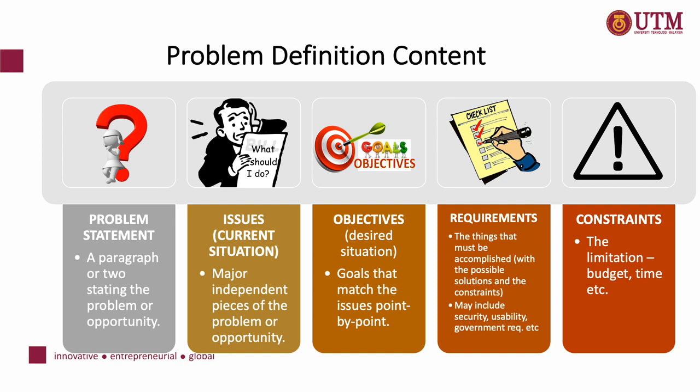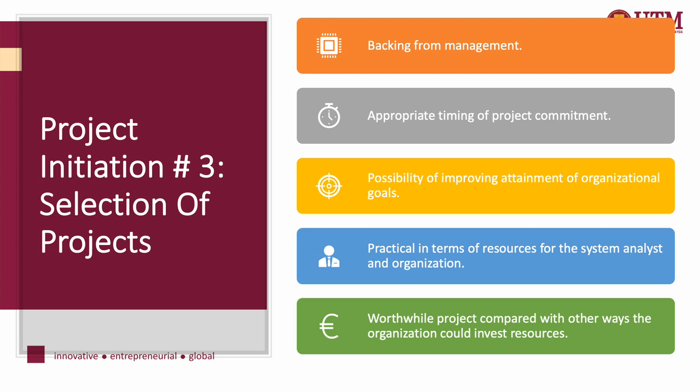Final step to begin or initiate a project is by selecting the project to be further developed. A project is selected based on a number of considerations or contributing factors, such as the selected project will receive full endorsement or backing from the higher management, who eventually will foot the bill or bear the cost of system development. Another factor is, it is the right or appropriate time for installation of a new system to improve the existing ones. And also, it is practical when there are enough expertise and resources to carry out the project. By having new project commitment, the selected proposed project is hoped to improve the organizational goals and targets.